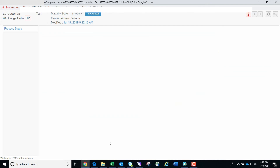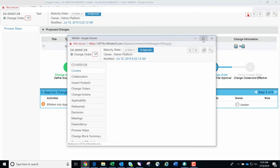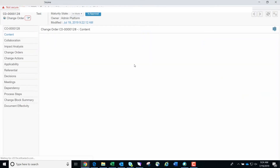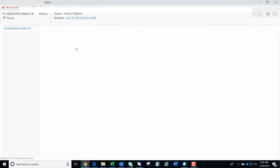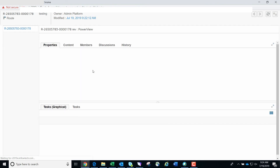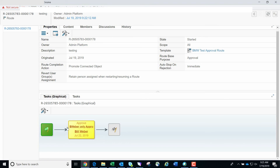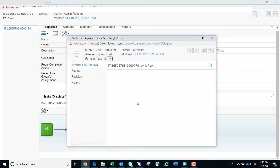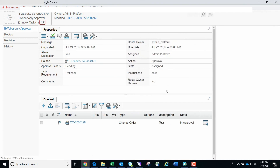This moves us to the fifth step of the CO process where the CO has to officially get approved. We open the CO by clicking the CO icon in the upper right section of the screen under the Change Information heading. Once the CO opens, you'll see a red square in the upper left corner near the CO name — this is a pending approval route that needs to be approved for the CO to move forward. We click the route, which opens in a new screen. We then click on the task within that route to open the approval task, click the Approve icon, enter our comments, and click Approve.